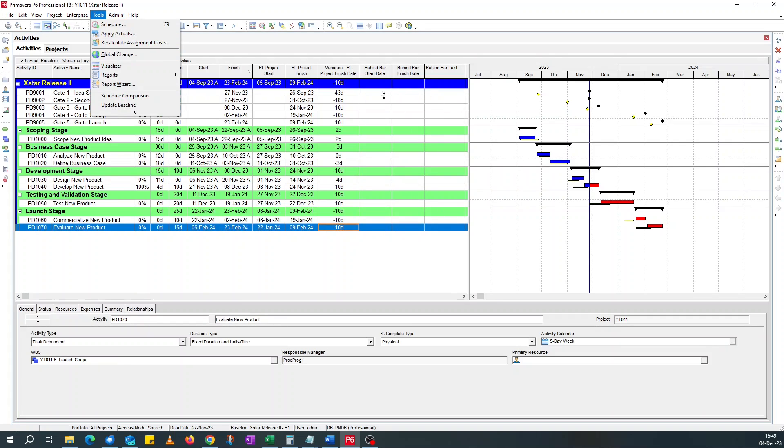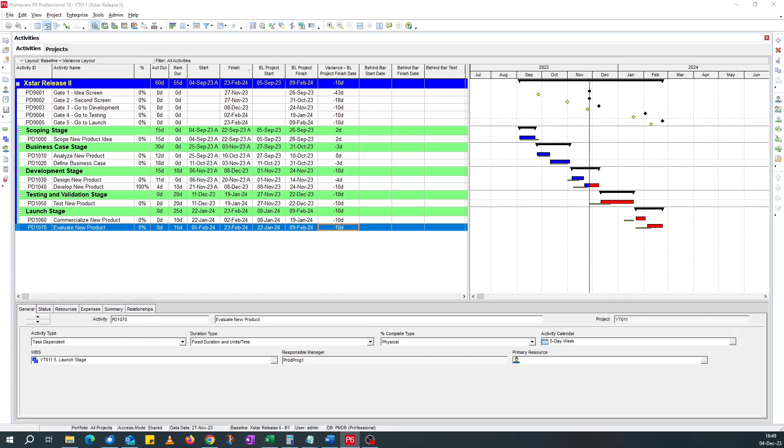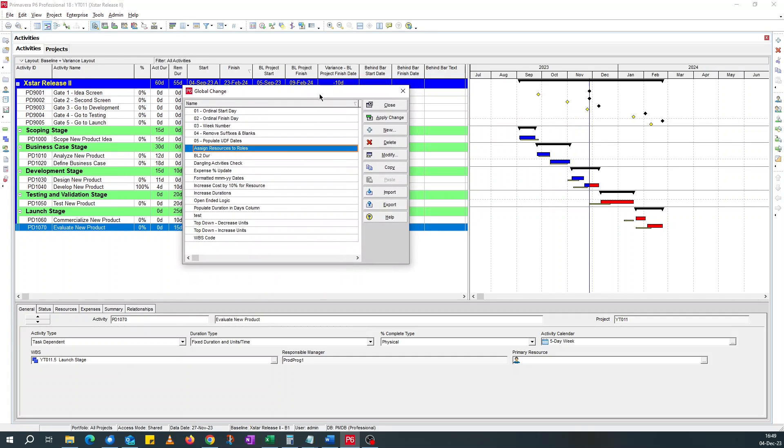So we need a global change to populate this UDF, this user defined fields. Unlike Microsoft project, where you can put a formula and it auto fills the custom fields. In P6, you have to always run a global change. And that's because the global change is quite powerful. So you need to be in control.